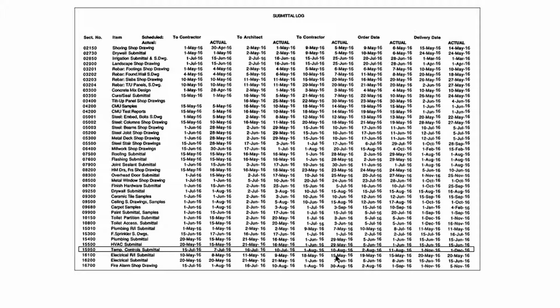Very, very helpful information for us to be able to monitor our projects. If you didn't have that, how could you possibly say the consultant is late? You didn't have them on a schedule. If I'm the consultant, I'm going to say, what do you mean I'm late? Where is it said when I was supposed to have this done by? Nothing there, right? So "it depends" is not in your favor, it's in the consultant's favor, and I don't blame them one bit. So you have to be able to document this information,